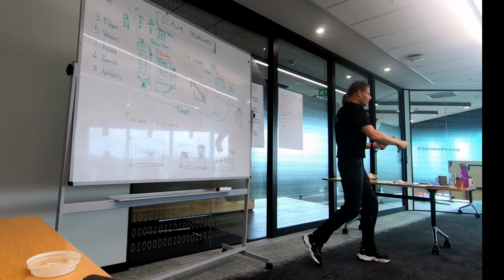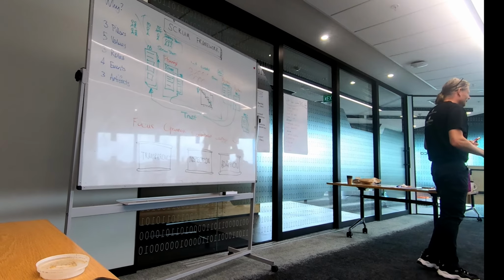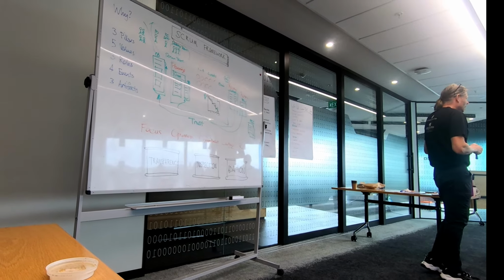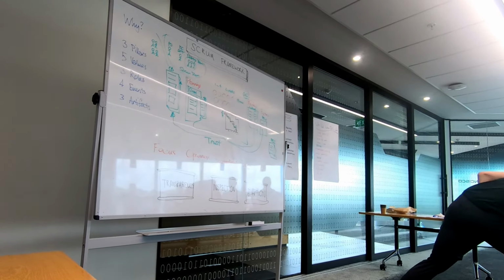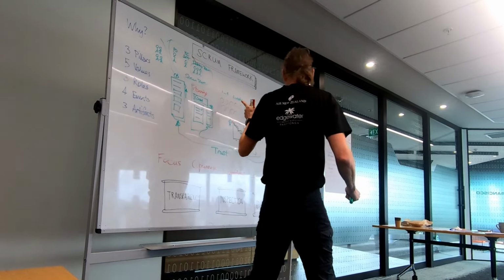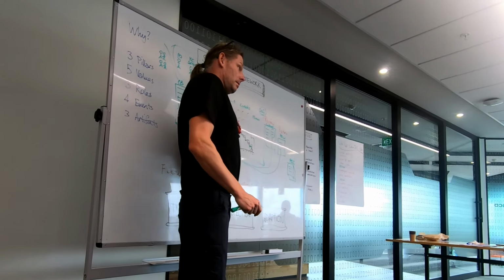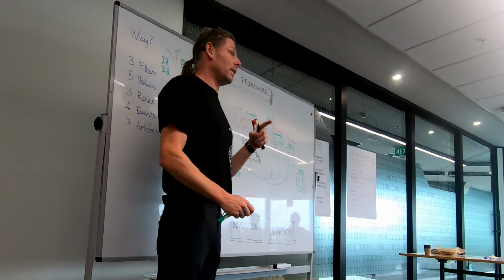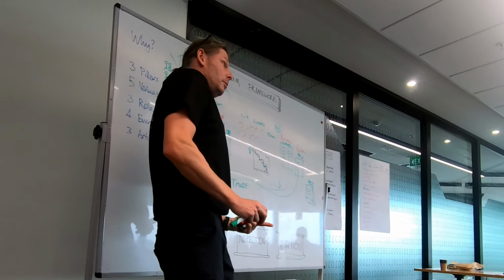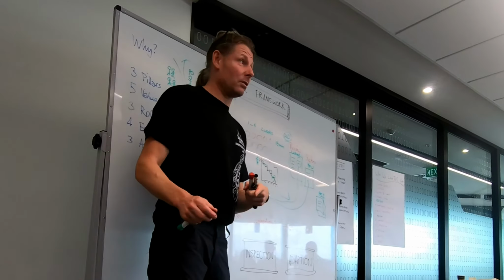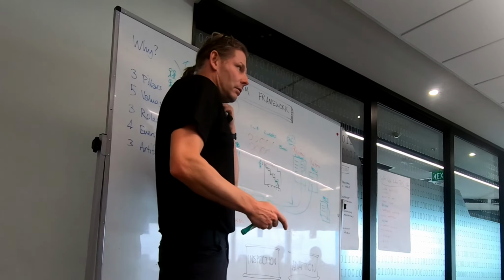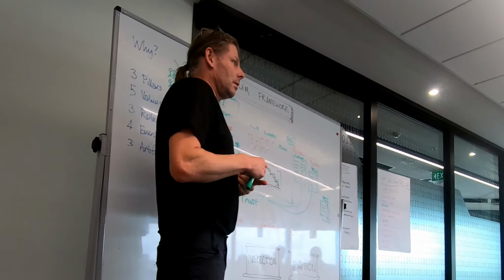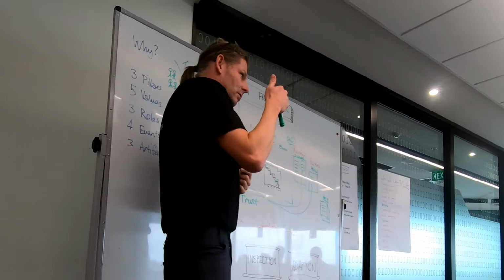Any other questions? What have you got, Luna? So does the Scrum Master facilitate all these events? Yes, they don't have to, they usually do. They have to just make sure they happen. So for example, with Daily Scrum, the Scrum Master doesn't need to be there. They just need to know that it happens. And in fact, a great Scrum Master will not turn up. Because if I don't turn up, does it still happen? If it only happens when I'm there, that indicates not a self-organising team. So a Scrum Master just needs to make sure it does happen.